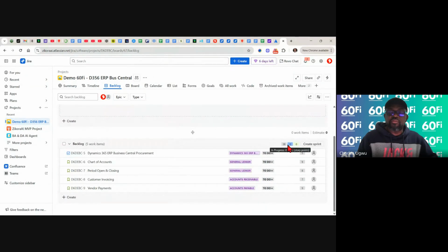That is the effort we have here. So this will help the team to understand their capacity. If their capacity for, let's say, 2 sprints is 38 within a similar project, then it means their capacity is 38.